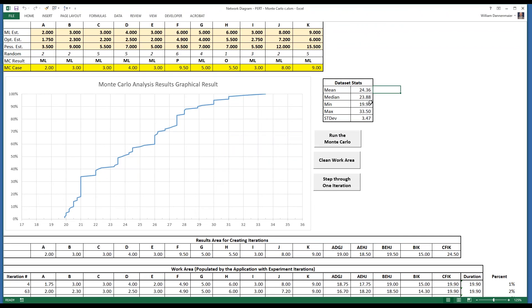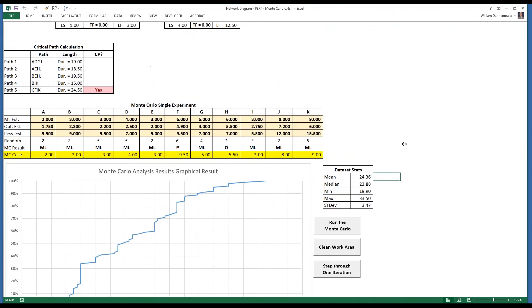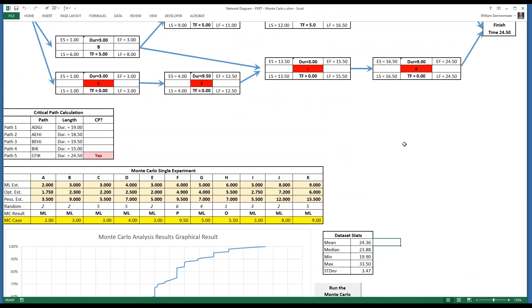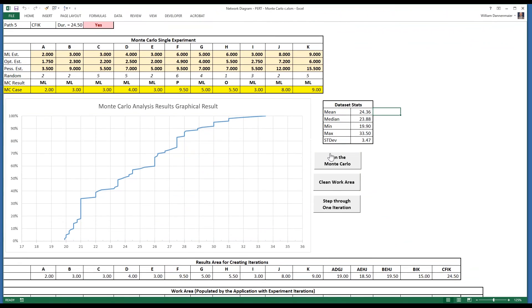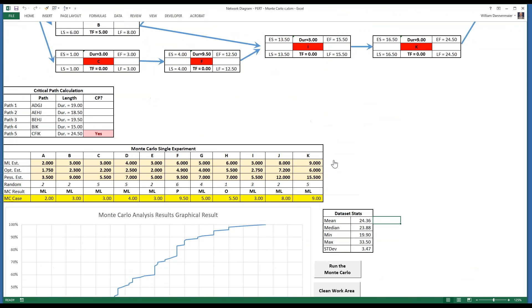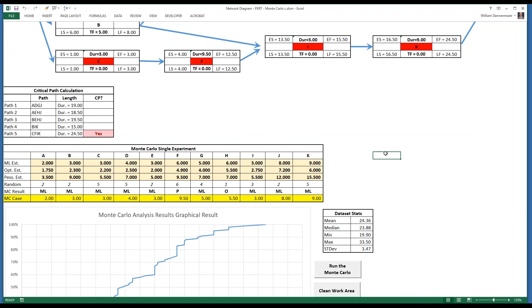Notice that now the minimum is 19.9 and the maximum is 33.5. The theoretical maximum would be if everything was pessimistic in the model. So the theoretical maximum would be the sum of the pessimistic estimates for the longest path in the network.